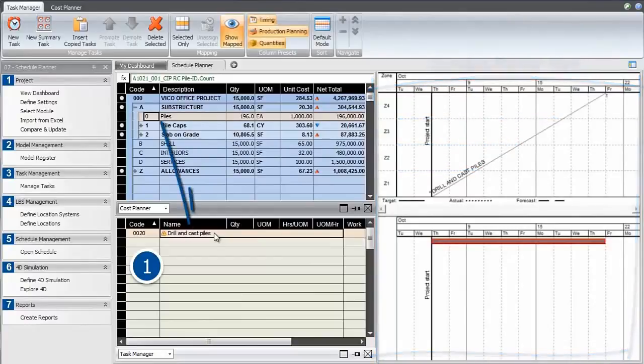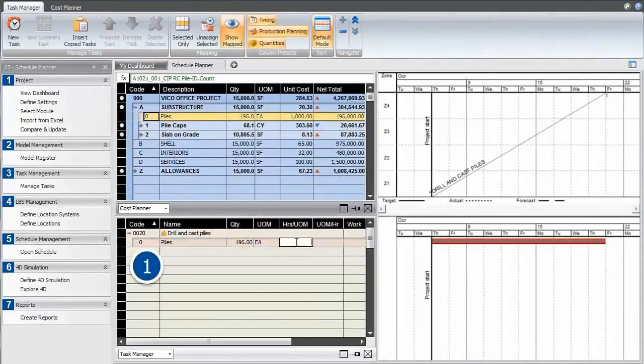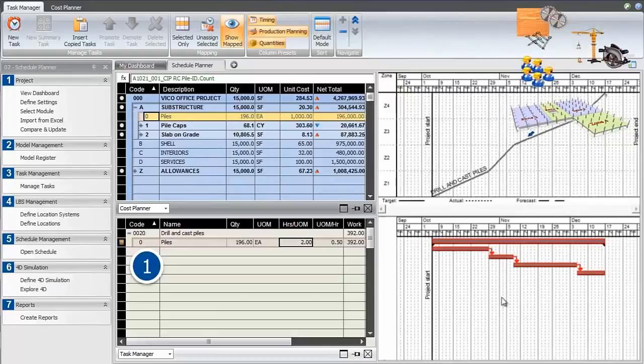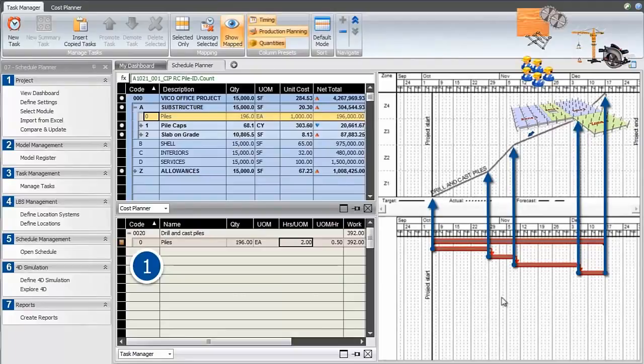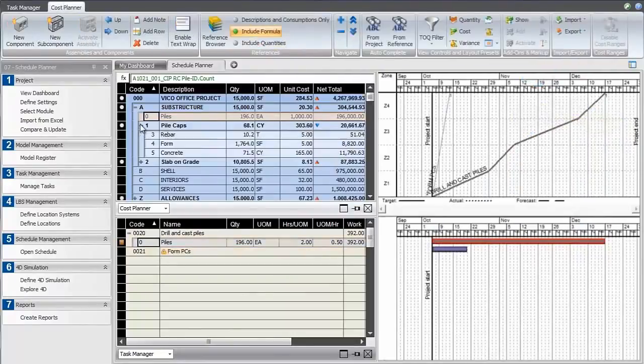By dragging and dropping from the estimate, we're going to leverage the integrated workflow and exploit any of the work already done by the estimator. The task is then loaded with quantities, costs and resources for each location where there is work. We see more accurate scheduling because of the calculation for each duration in every location. Because of the varying quantity of work, we have a different duration.